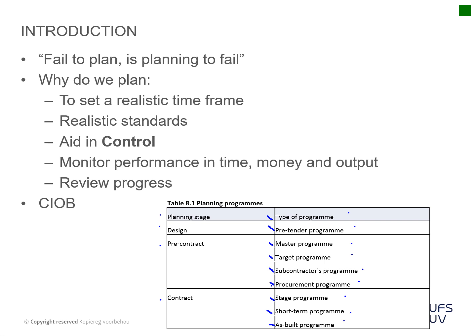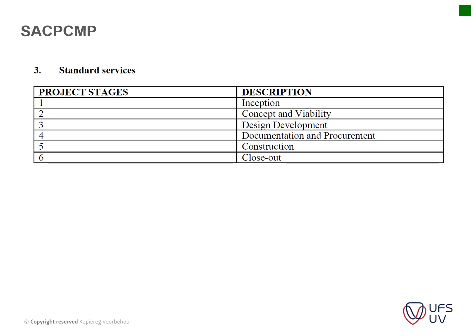As things change, your program is constantly being updated. For your task you're basically looking at these two programs, which incorporates your construction period — but that's usually only a one-liner to show the contract period will be three or six months. You don't have detail such as when foundations are laid or when the roof goes up. Also highlighted here are the different stages — the extract shows the SACPCMP, which is the Council for Construction Project Managers, and it's exactly the same as the QS and architects' stages.